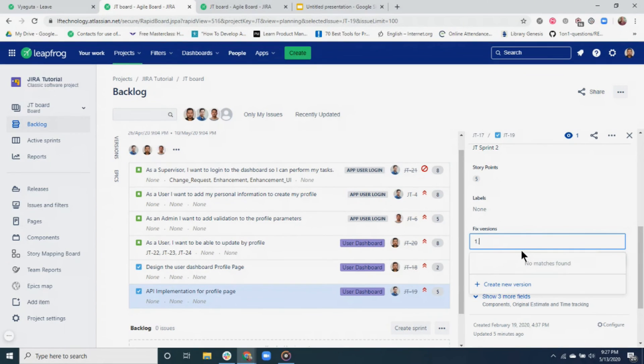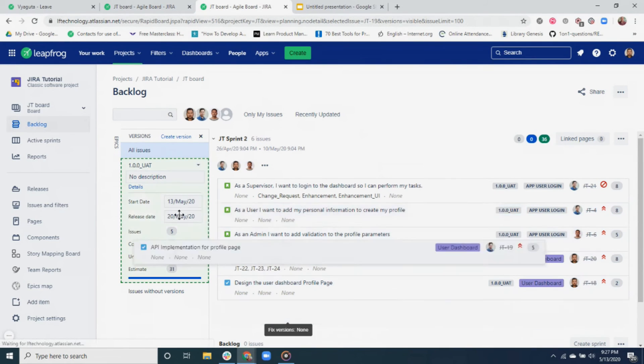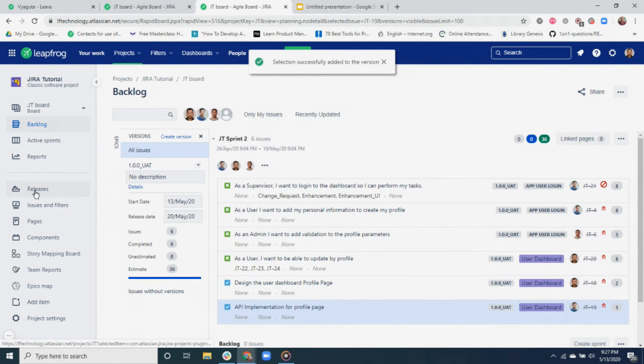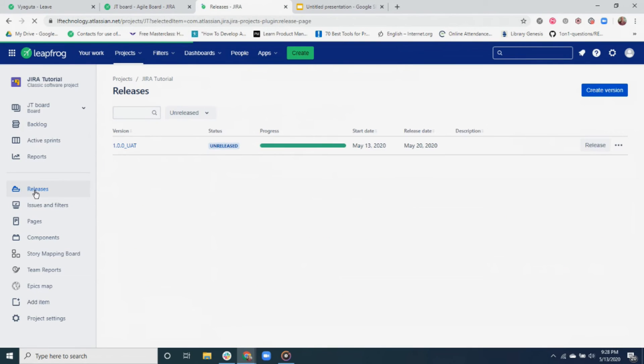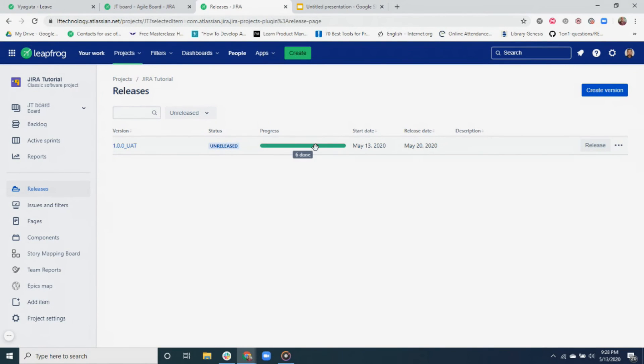Okay, let's go to the release section to see the status of our release. You can see that it is set as unreleased now. The progress bar also shows the tickets that are in different statuses in Jira board. All tickets should be in the done status before we release a version.